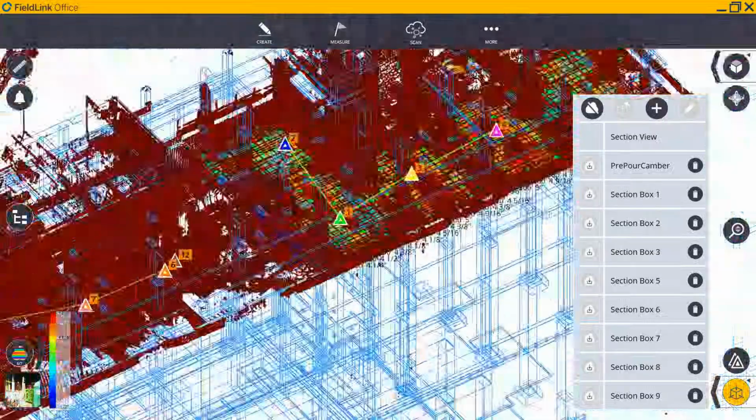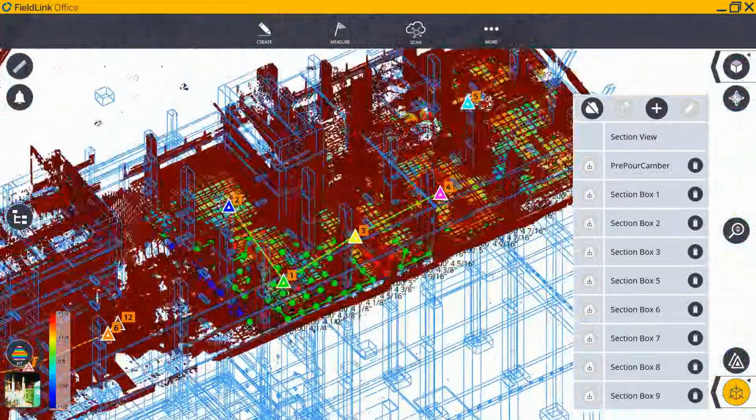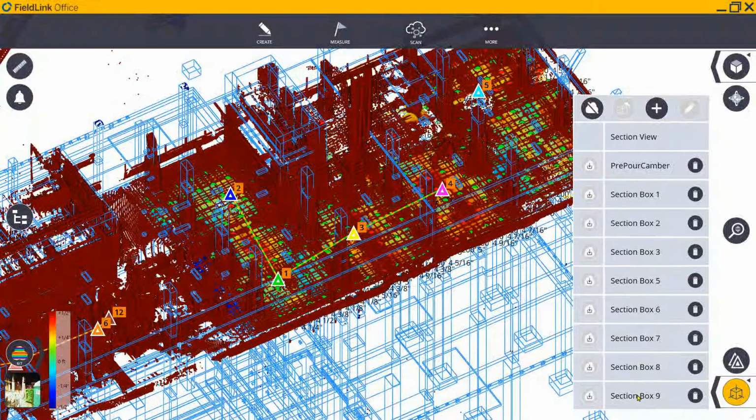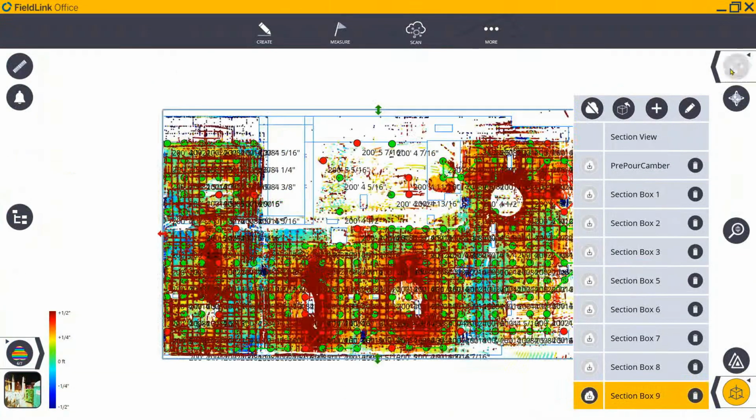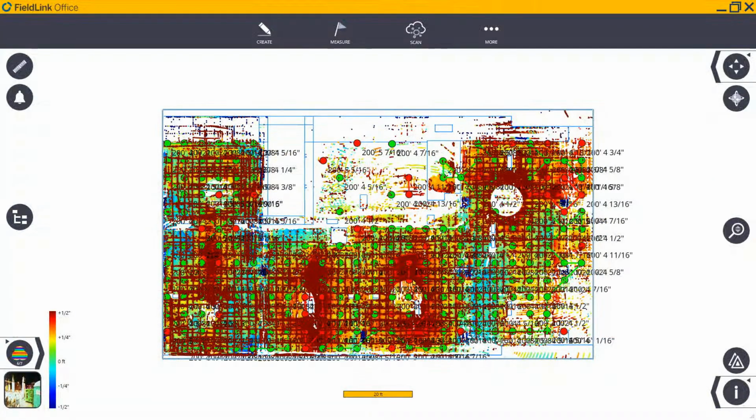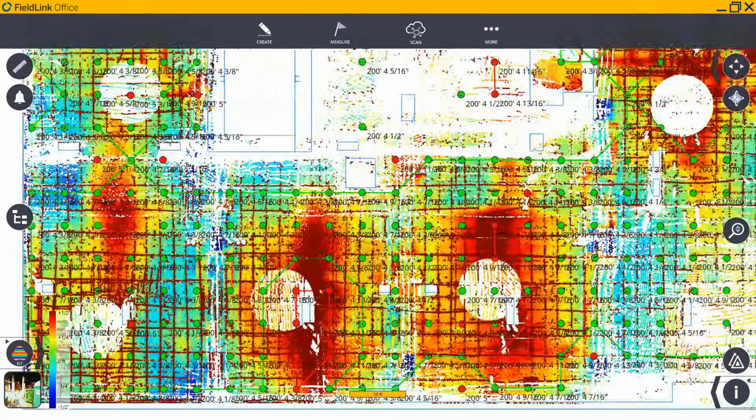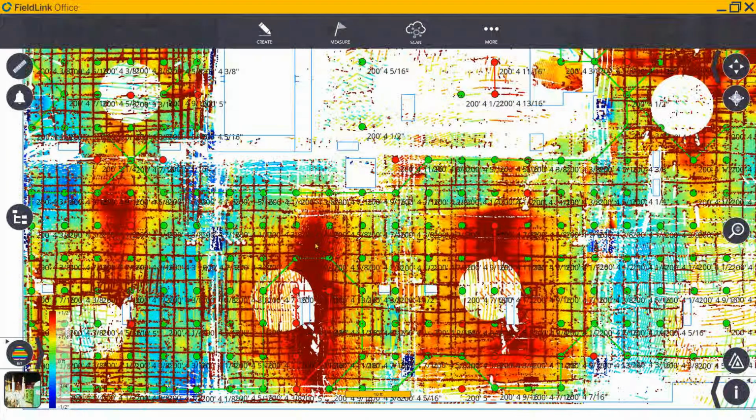But with an elevated deck, we're kind of stuck to the camber of the steel or the formwork below it. So here you can see this is pre-pour. We see some rebar, BT deck, a bunch of other stuff on the ground, kind of showing me where we could have some issues of this being too high.